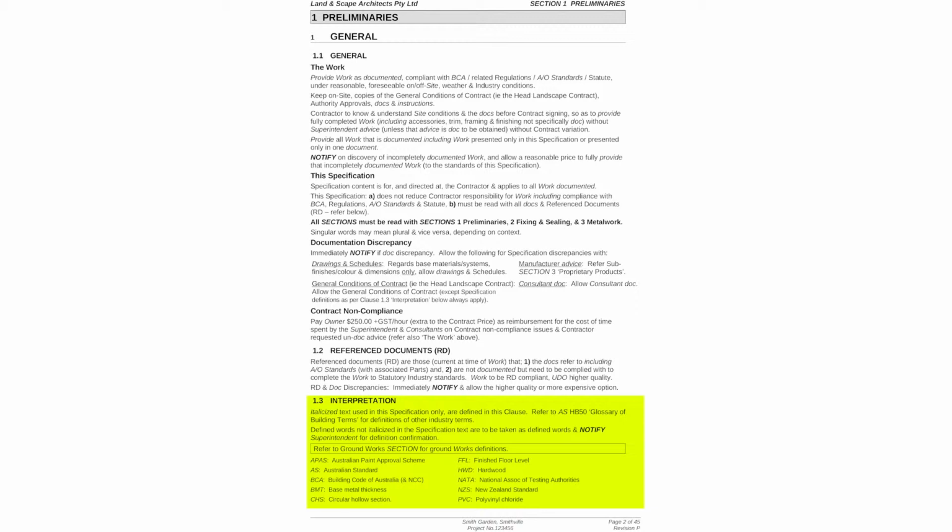Now for some important definitions to show how carefully these have been planned. Remember, the aim of this spec is minimal or no disputes. Advice is written, not verbal. Consultants draft documentation. Engineers are contractor employed. Remember, these definitions are only for the specification. Documents and drawings are contract documents only. Exposed to view is that visible at practical completion without disassembly, which helps define extent of finishes.